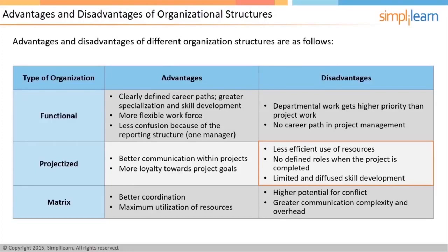Therefore, this might lead to the duplication of effort. It also leads to the resources being left with no work, since their roles are over once the project is completed. It also hampers skill development, because the project requirements dictate what kind of work team members perform at different stages on a project.